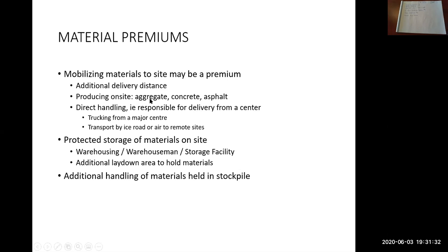Actually, locally, I've done that for a project in Abbotsford. It was a Ministry of Transportation, so BC government, highway job. If you, the contractor, wanted to, you could bring your own plant into the ministry's gravel pit and produce your own gravel at a cheaper dollars per ton than the local gravel suppliers would provide it for. So there's an advantage there if your company is capable of doing that. Same thing with concrete.